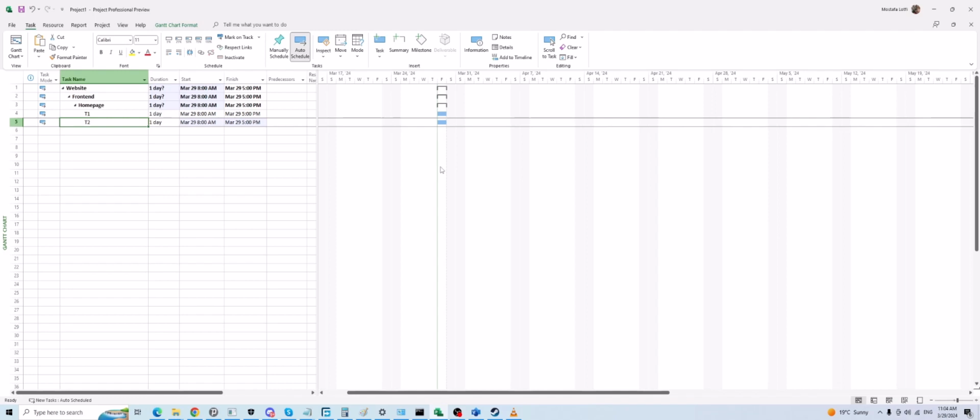another task is not finished and that person is not available at the moment to continue the monitoring. So person number one at the end of 8 hours finishes the work, then leaves, and after 1 hour person number two will start working. Still the link between those two is valid because it is finish to start. Person number two can start working after the end of work for person number one. Person number one finished his work and left, right? And then person number two starts working.